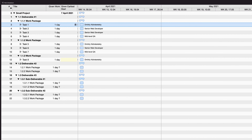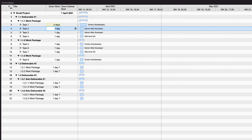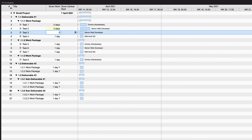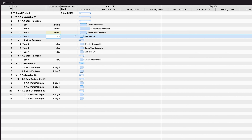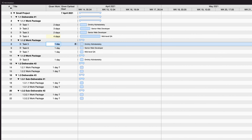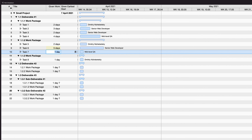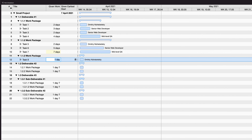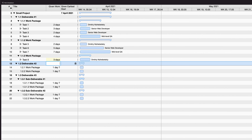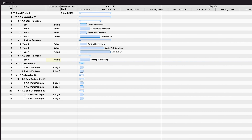So now we have a task with a description of what needs to be done, a person assigned, and tools and materials. Next, we estimate how long it will take for that person to do that task. In addition, you estimate costs and the amount of materials and equipment needed. Only now do your tasks get the length of bars on the timeline, because that's their duration.